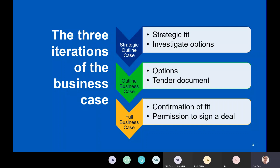The full business case is actually the one that should have the least amount of work, because it's about confirming that a supplier can meet the needs of your chosen option. It's confirmation that the option still fits the strategic need — which can change during the time it takes to produce a business case — and it's permission to go ahead and sign the deal and spend the money, whether or not you've gone to procurement.